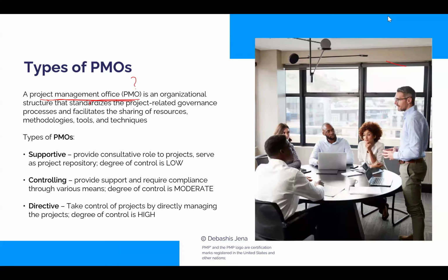Himanshu says helps in resourcing in the project, onboarding, offboarding. Yes, agree to that. Set up all document templates. That's right. If there's a PMO, they would define the project process templates and all. They will mandate its usage also. Rightly said. Gave a lot of answers. Train project managers. Yes, even that. PMO can cater to the training needs of project teams. Monthly project status to be provided to PMO. PMO may demand that from projects, because PMO would do a lot of reporting across projects to the senior management. Very well.